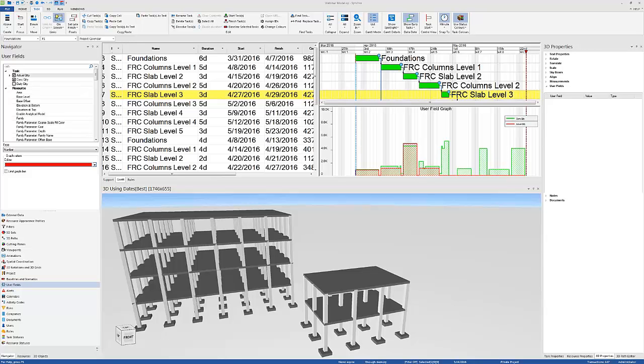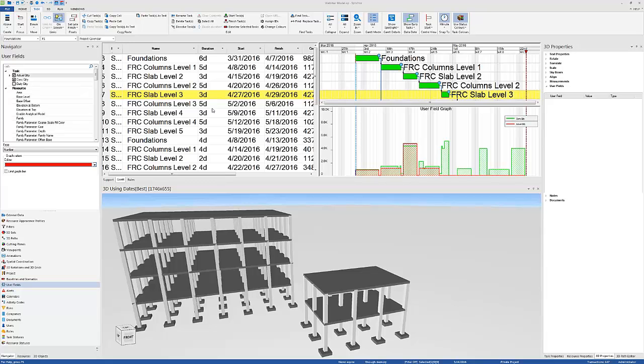I don't see any questions coming in at this time. I can mention something that I didn't mention before. We use this feature, Copy User Fields, to copy user fields from the model elements to the Gantt chart, to the task, but you can also do the opposite. If it's a string value, you have the option to not just sum them, but you can also concatenate. So if you're copying element IDs from the model elements to Gantt charts, you can do that. Or if you're copying task properties such as directions, you can add them up into model elements so that later on when you're reviewing your model, you can click on an element and see how many man hours have been spent on this element and use this for future estimations. So you can do a lot more with this feature than what we just showed today.